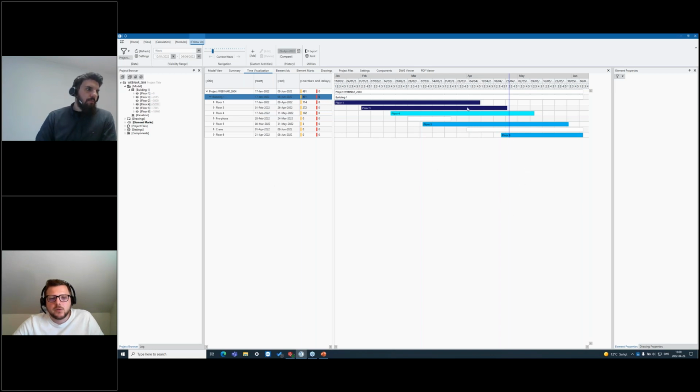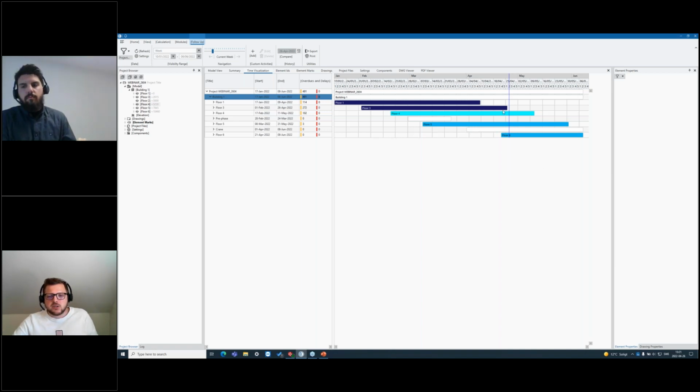Then it might be that you want, maybe 26th of April, that you have some issue where something happened, let's say that some elements came as they should, but you didn't prepare everything around it because something in the project was changed. So then you can use this compare functionality. Select the date, so today, and click on compare. Then you will see an identical Gantt chart down here, but for the original plan.